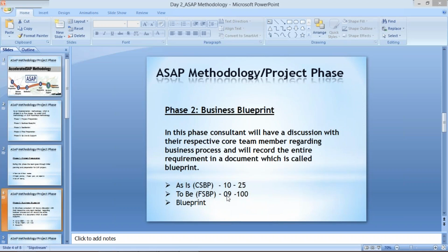But if we are going to go for any customization or development, it means we have to bring some extra resource for that, or that is an extra activity you can say. So for that there will be certain negotiation that you need to pay a certain extra amount. That is a different kind of negotiation. If the client agrees, then we are going to deliver, and a timeline and everything will be set for that. If they do not agree, then we are not going to deliver that.